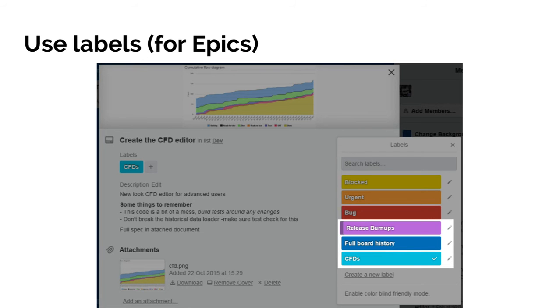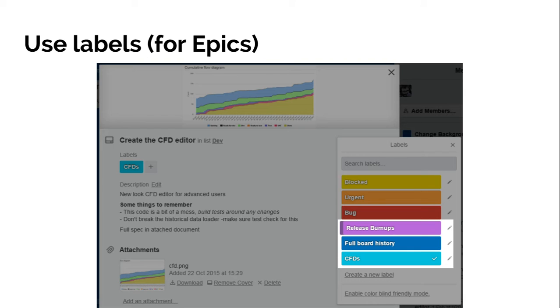First off, epics, people seem to be using labels. Some people use lists for epics, but then the problem is obviously when the card moves out of that list, you've got no record that it was part of that epic or is part of that epic. Whereas with the labels, that sticks with it throughout its life.